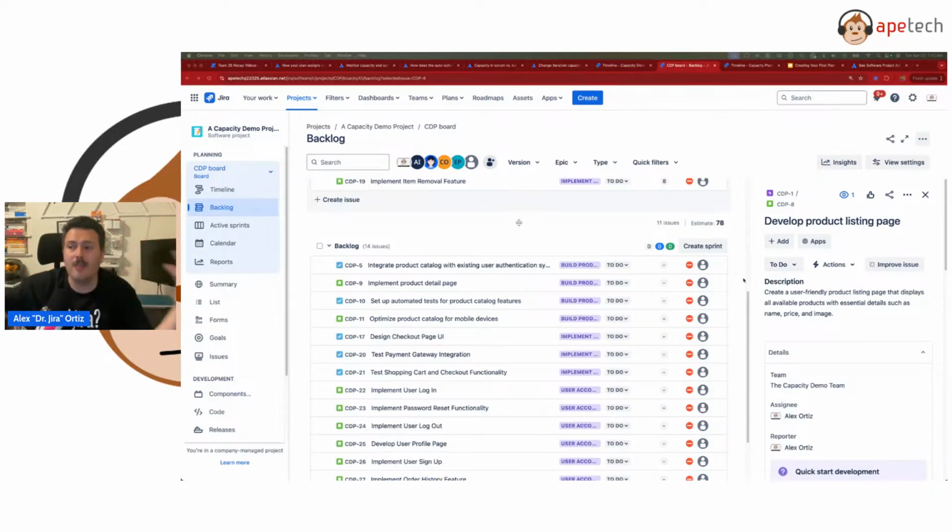So when you have a list of tasks that need to get done, I typically tend to lean more towards, well, let's assign the task that makes sense to the person that's going to have the highest probability of success here. So that's why I like assigning work. And the second thing that I've seen is that when you don't assign work, then traction tends to not be as high, right? Because you end up saying, oh, well, I thought this person was going to do it.